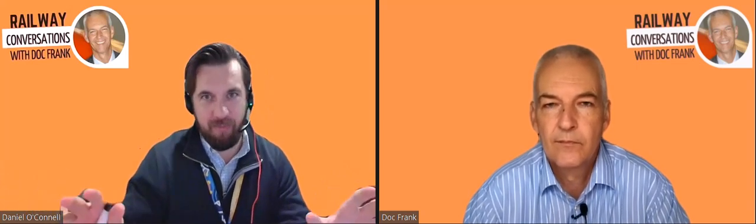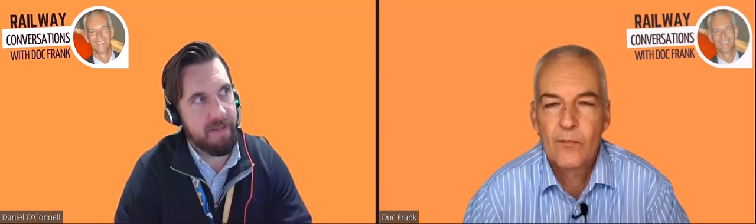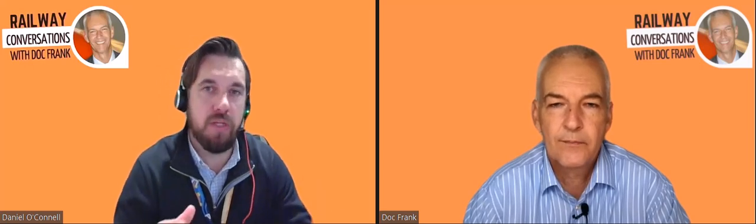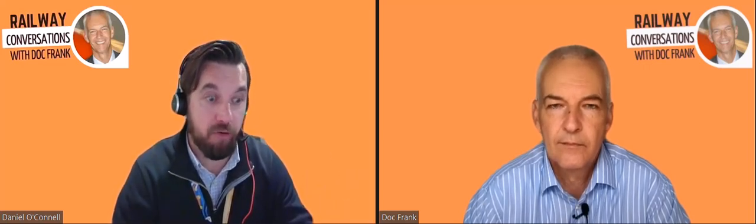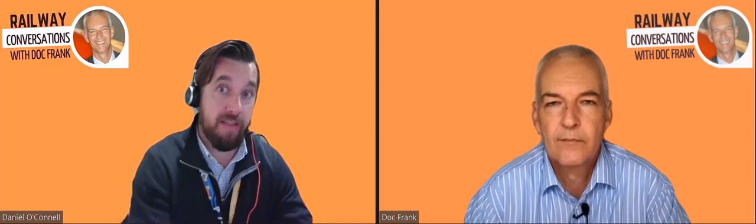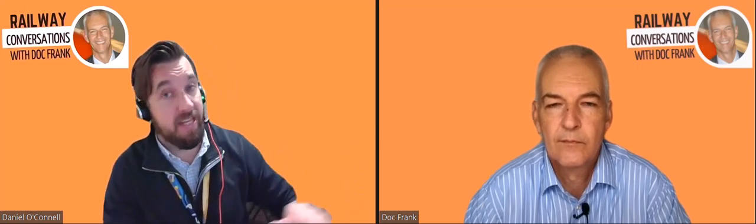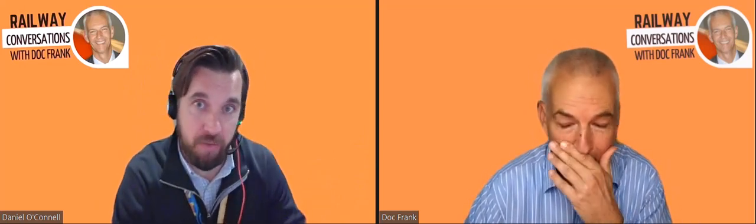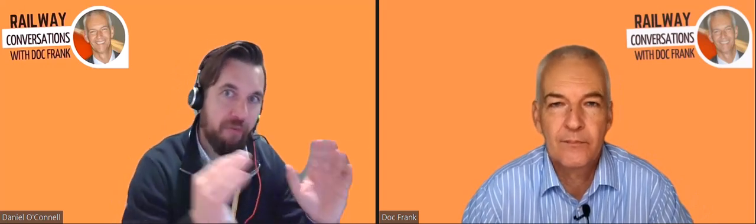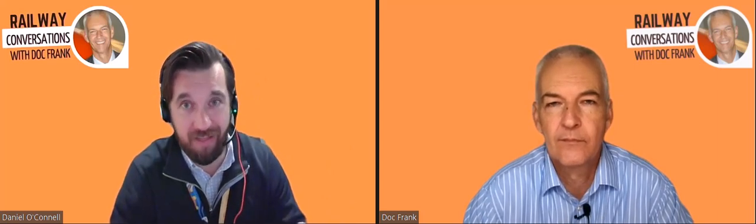But again, with unlimited restrictions on time and people wanting access as well, because the big part that I always find in delivering metro systems with new tunnels and new stations is you've got two very different work streams that are intertwined, but both want priority across each other. So that's the railway corridor, then the station system delivery. And the impact of that station system delivery on the railway corridor upstream could be someone isolating a distribution board that has downstream impacts that we don't have visibility of, impacts the signaling system. So it's always quite difficult to play them off, but they're both fundamental delivery milestones for a project that need to be controlled and work in parallel. If they don't work in parallel, then you're going to find it very, very hard to succeed.